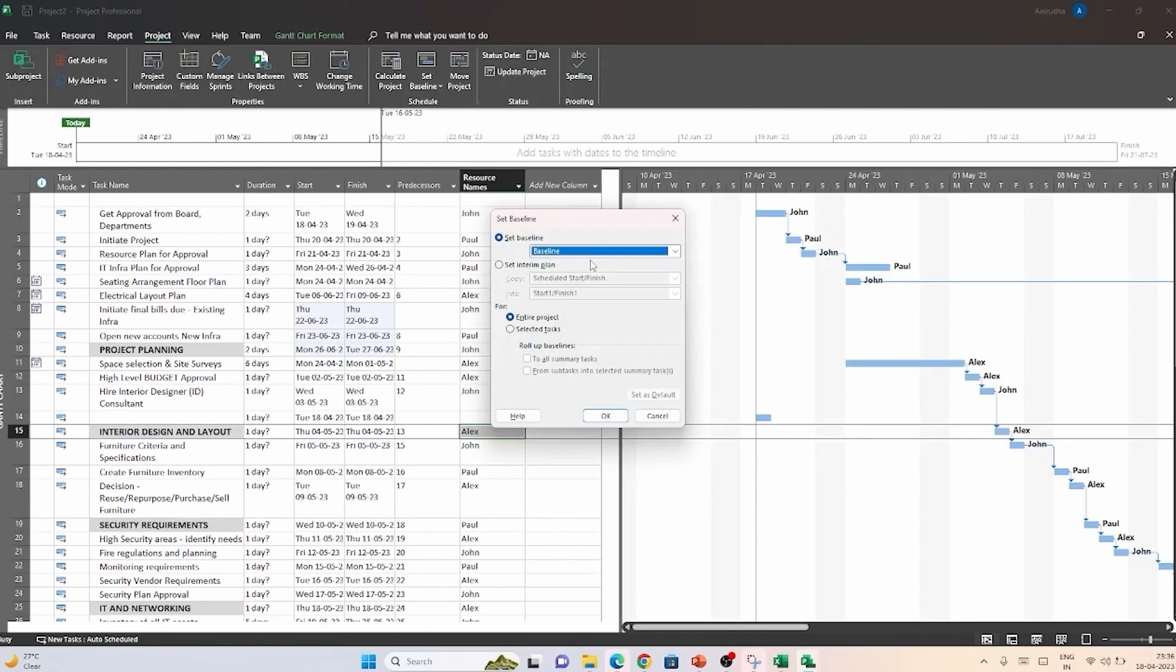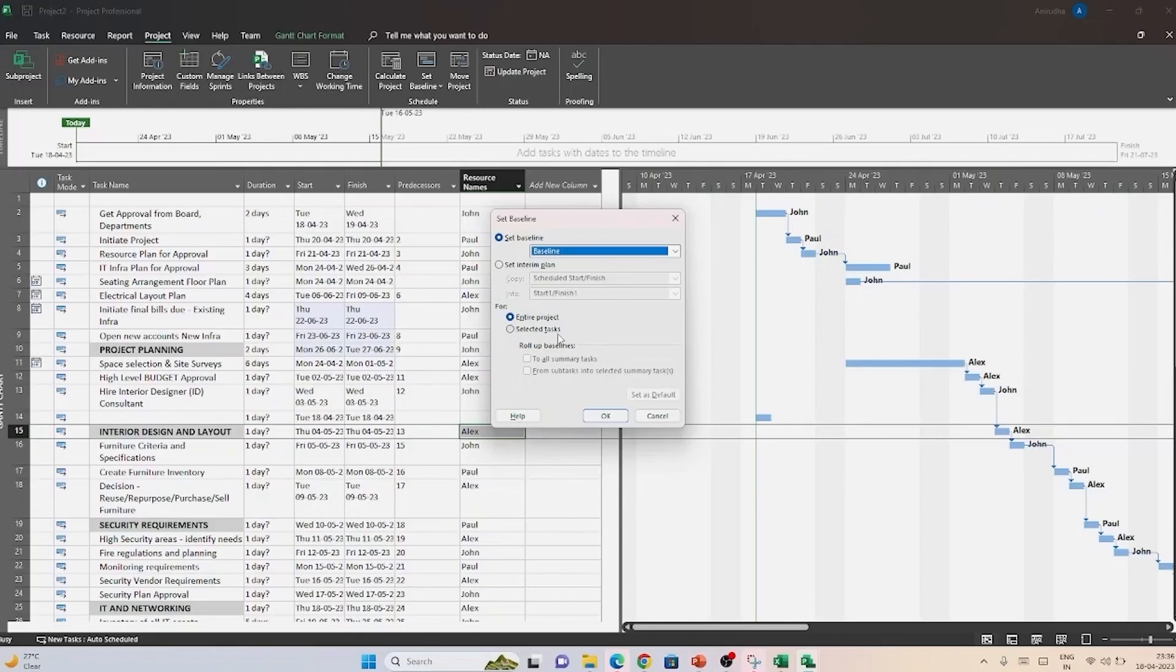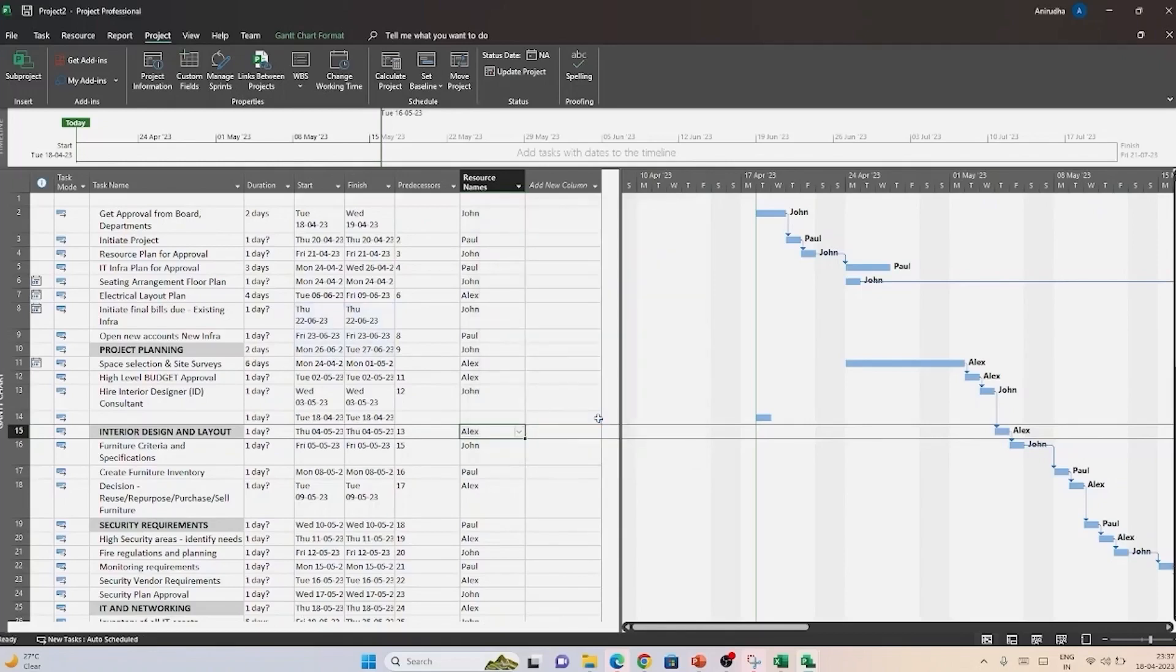You can then choose from the second option, how much you want to baseline. Whether it is for the entire project or is it going to be the selected task only. While this second option is good, what we want to do now is to baseline this entire project. And we will just retain this also for now. And when you click OK, the entire project schedule has been baselined.